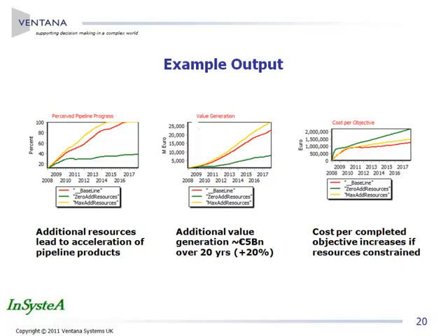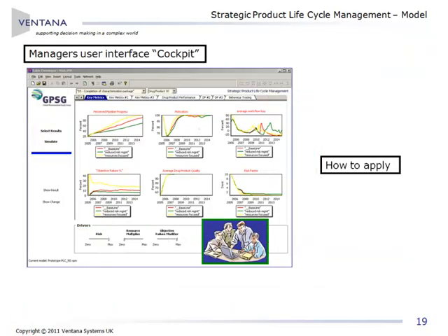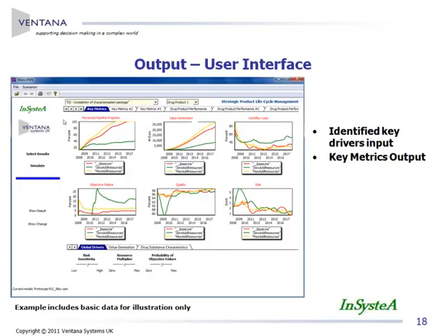We have 3 simulation runs here. We always have a baseline run, which I think is red. Yeah. So we have a baseline run, and if I just go quickly back up, there's something on here called resource multiplier. Now, in this case, what this means is when a drug product is going through a particular objective, it needs X number of a certain resource. If that objective falls behind schedule, they are able to allocate additional resources up to a maximum. You can't have 300 lab technicians working on one particular objective, for example.